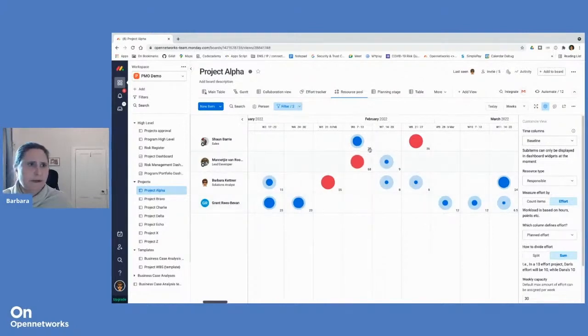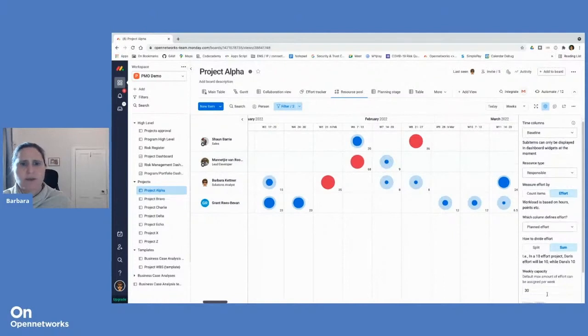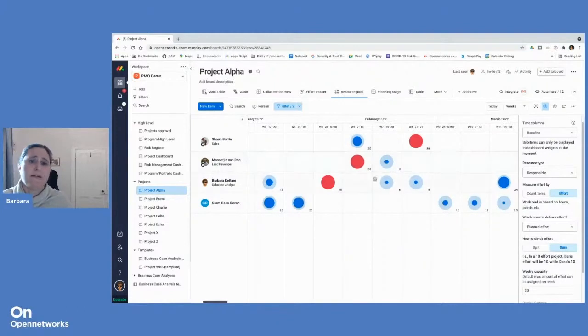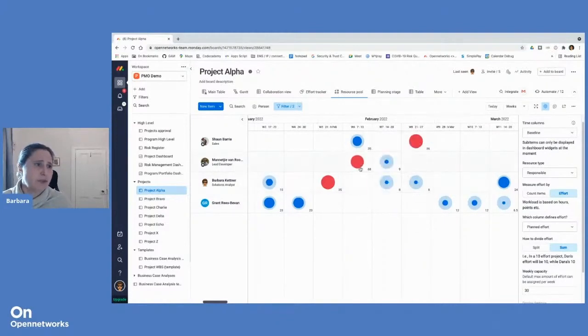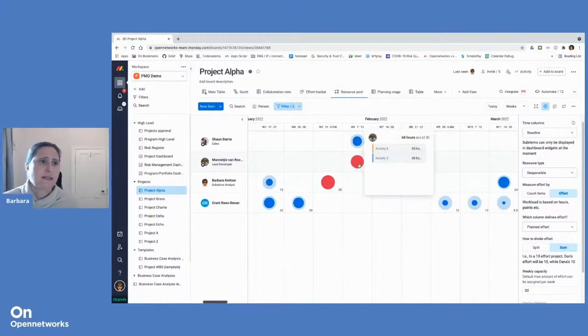What's superb about the visualization is that I can set what the weekly capacity is, the total number of hours anyone can do in a week. And if it's greater than that, it will highlight it in red. So very simple to see that Manarchy is going to be completely overwhelmed and not sleep in week six.